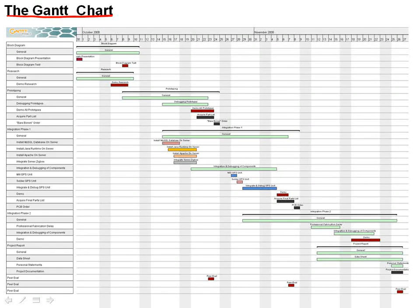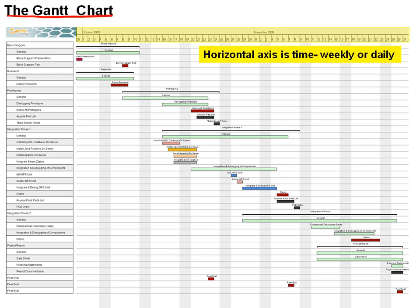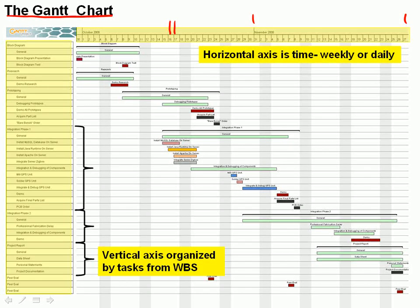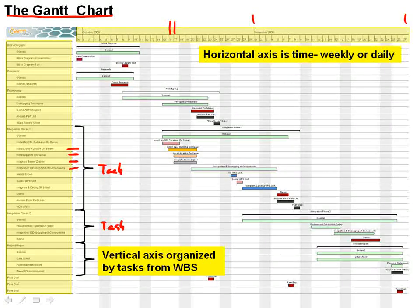Here's a Gantt chart that corresponds to the block diagram we saw earlier, put together by a team. The horizontal axis, highlighted in yellow, corresponds to time. Each of these little ticks corresponds to a day, and the bigger ticks correspond to weeks or months. The vertical axis is organized by tasks, taken directly from the work breakdown structure. On the level 2 or level 3 work breakdown structure, this might be a task, and the subtasks on the deeper levels are given by these individual lines.